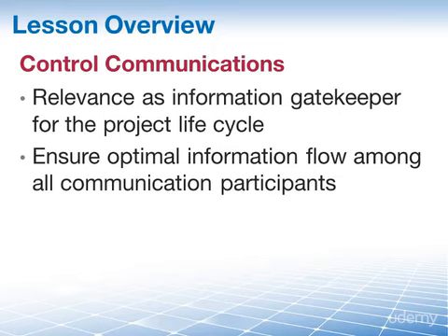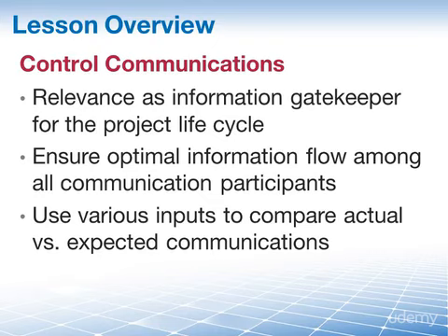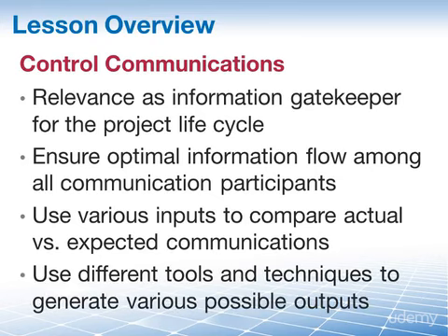In controlling communications, you need to compare how actual communications are carried out versus how they were planned to be, as reflected in your communications plan, standards, as well as expectations. And you use different tools and techniques to generate various possible outputs, such as work performance information, change requests, and other updates.